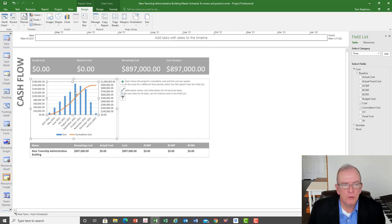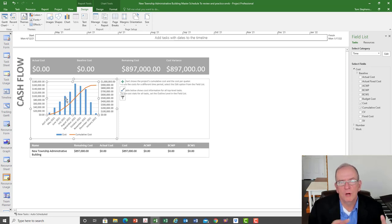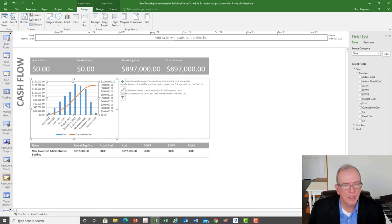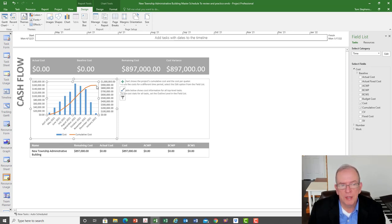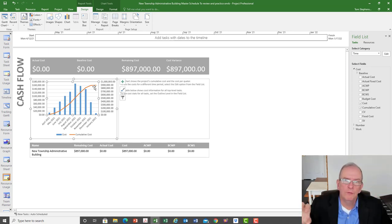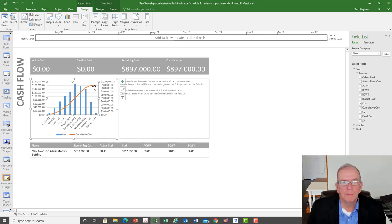This gives me a heads-up on potential shortfalls. I can forecast how much cash I'll have at that point and whether I need extra amounts on my line of credit. I can also look at whether my progress billings will cover that. The cumulative line shows the total paid out — around $897,000 for this project. I need to make sure the money coming in is more than that, because I have overhead and profit to cover. If $897,000 goes out and $897,000 comes in, I haven't covered overhead or profit.